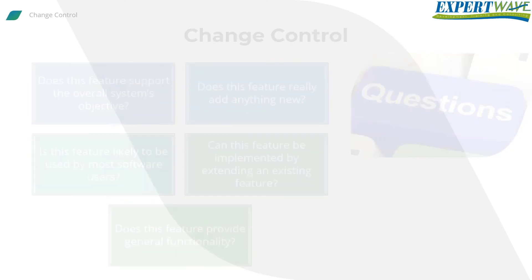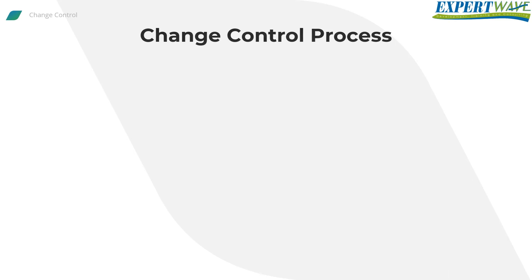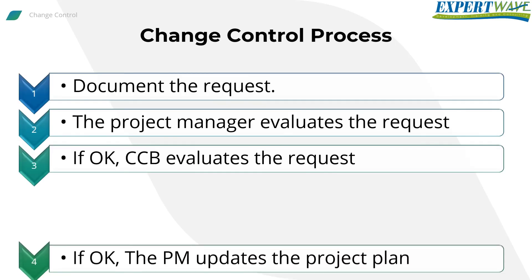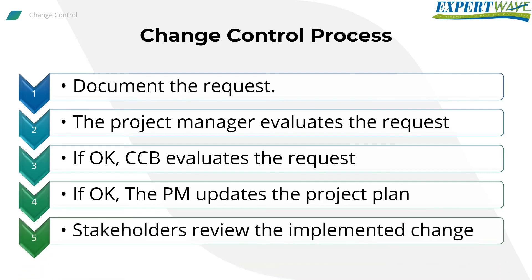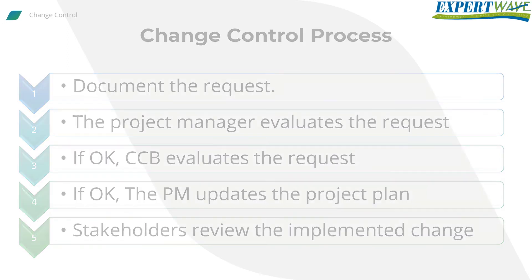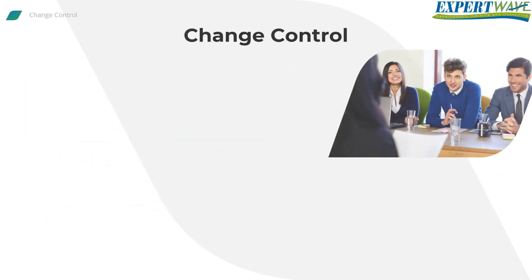After the CCB approves the change request, the project manager updates the project plan to implement the change. After implementation and testing, the stakeholders should review the change. If the customer is satisfied that the change has been successfully implemented, the request should be closed.